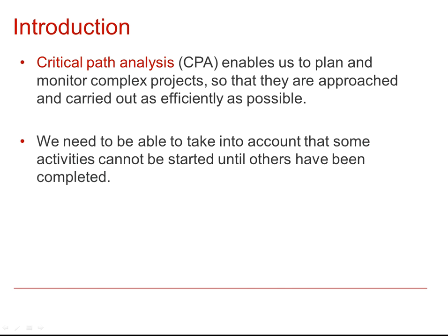We need to take into account what's called the precedence of the activity, so that some activities can't be started until others have been completed. For example, if you were writing a letter to a friend, then you can't actually post the letter until the letter has been written. A silly example maybe, but it shows the idea of one activity having to be completed, or maybe several activities being completed, before some of the activities can carry on.